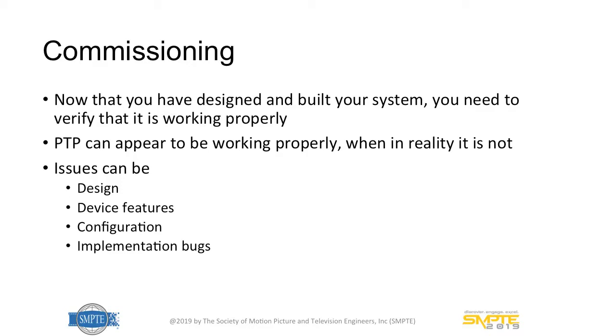So in the commissioning, now you've designed it and built it, you want to make sure, is it really working? One thing about PTP is it may seem to work, and it kind of works, but it may not actually be working as you expected. Some issues that can come up: maybe in your design you've got some issues, maybe some of the features in the products aren't there, you may have configuration errors as you were configuring all the switches and devices. And unfortunately, some of the grandmasters and media nodes have bugs in them.